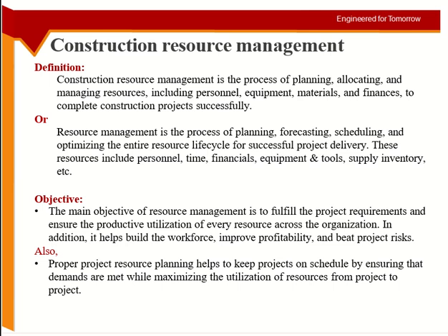Same thing with the equipment as well. You bought the equipment because you thought, oh, I have 2 more new projects. But you didn't think that the schedule of the project can be arranged in a way that I can use the same equipment on both the projects at different times. So you will maximize the utilization. Don't maximize the resources, maximize the utilization of the resources. We don't want idle equipment, we don't want stored material, we don't want idle people just taking a salary. We want them working on different places at different times. So we want better planning, not better buying, better planning.